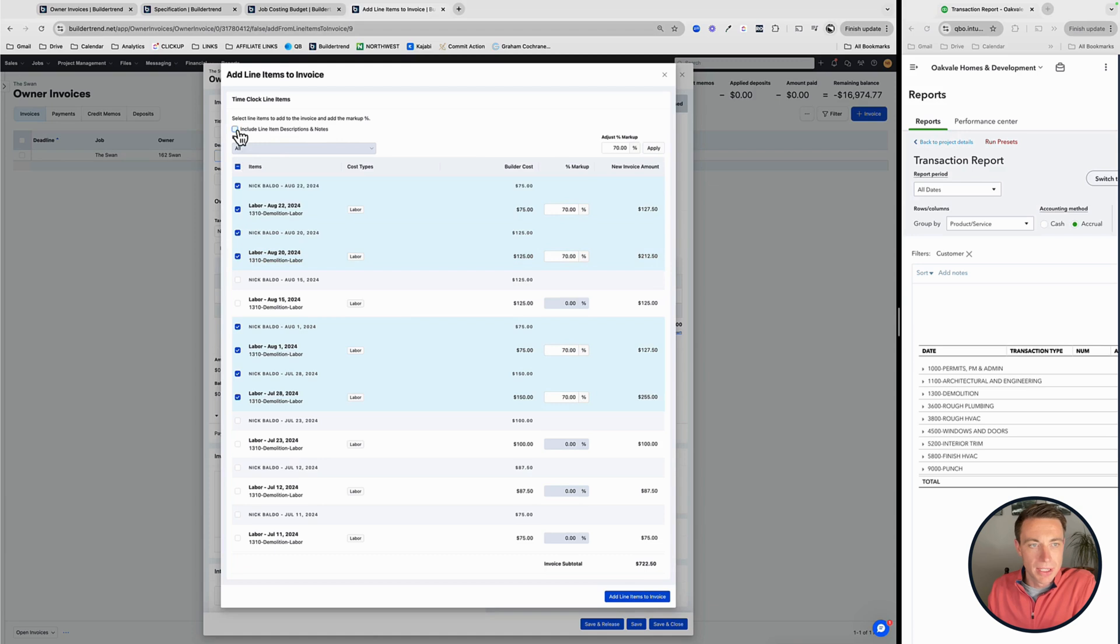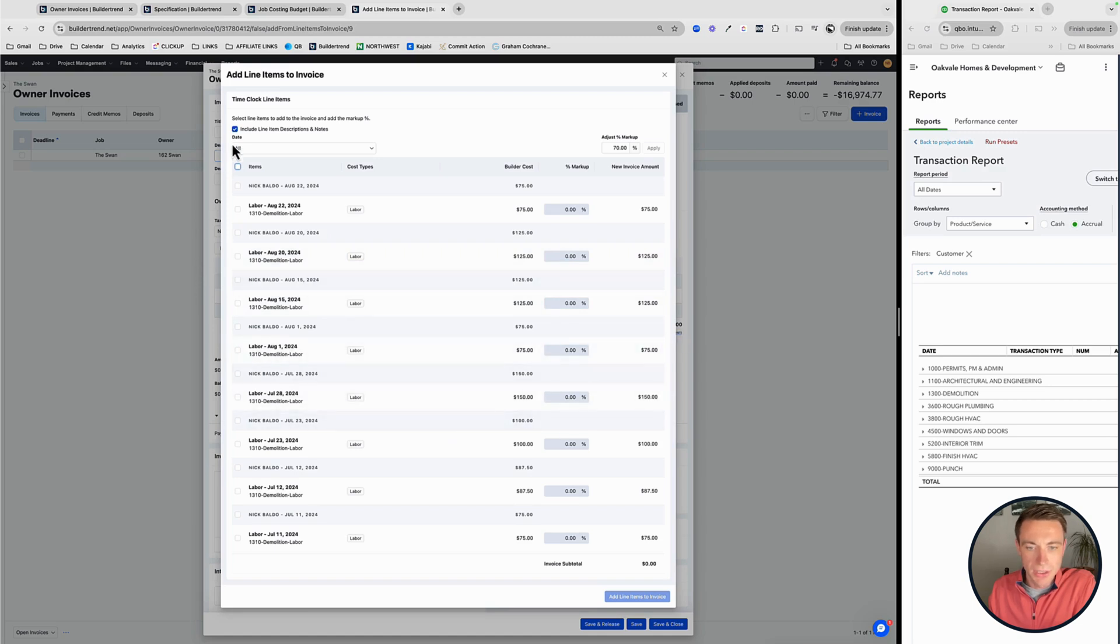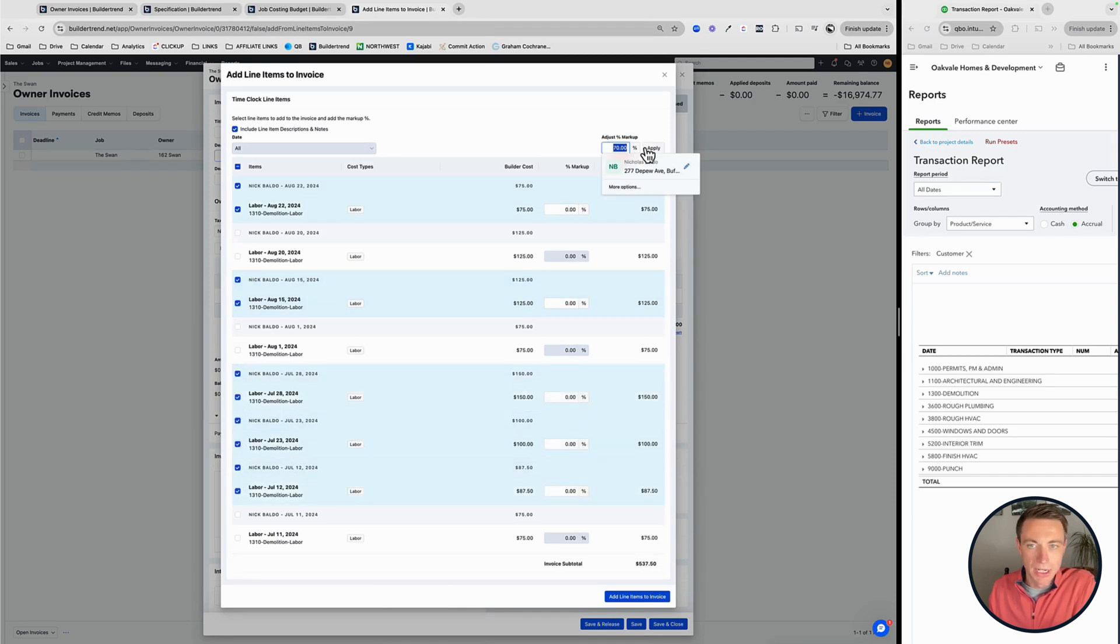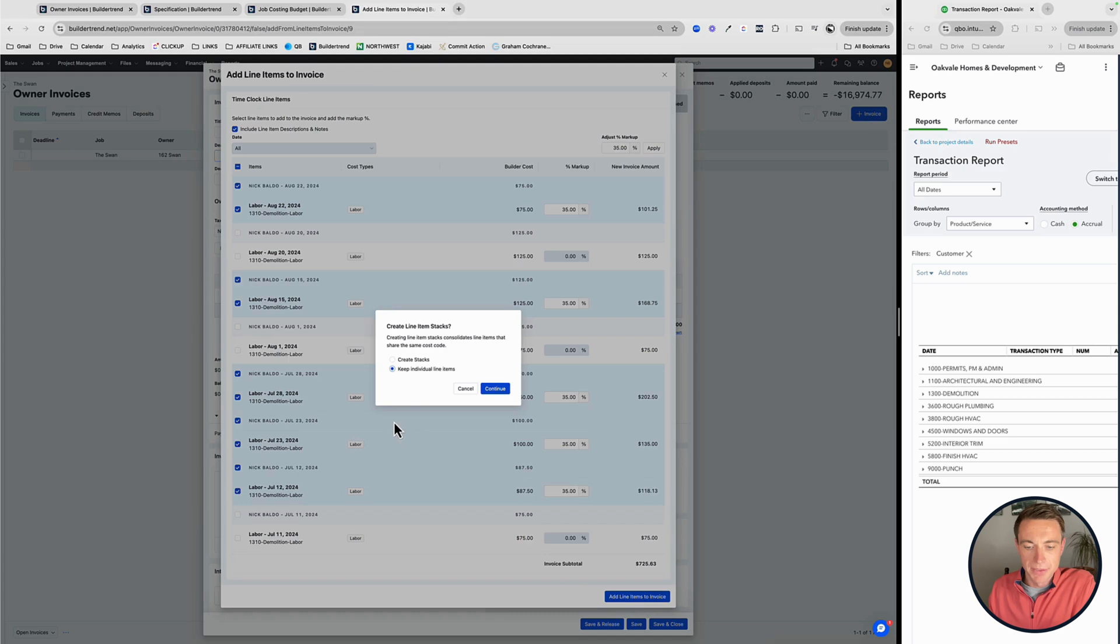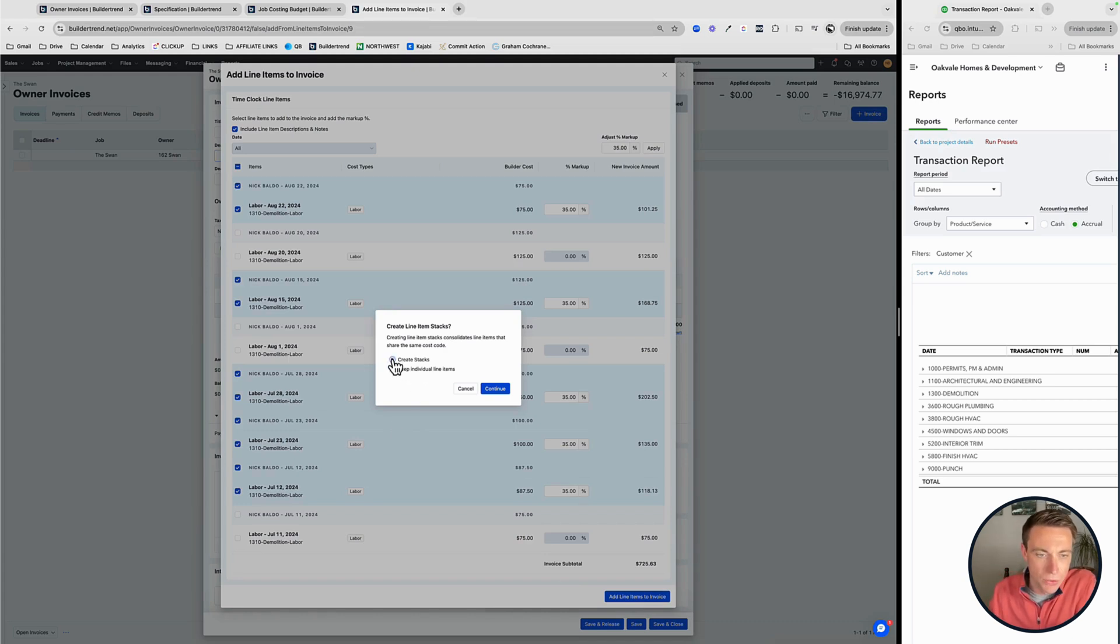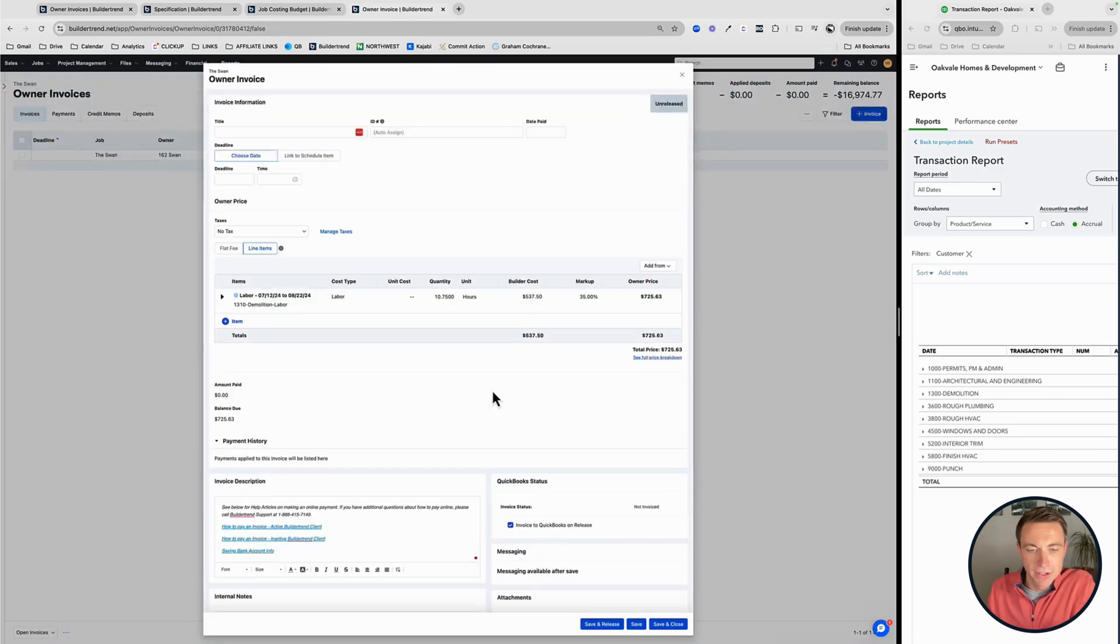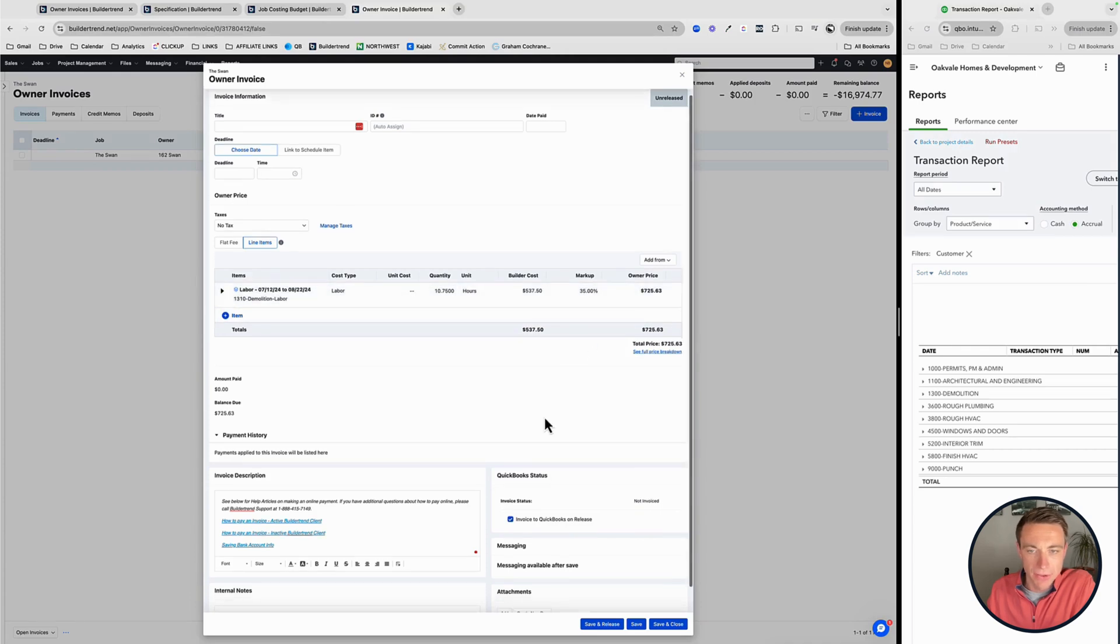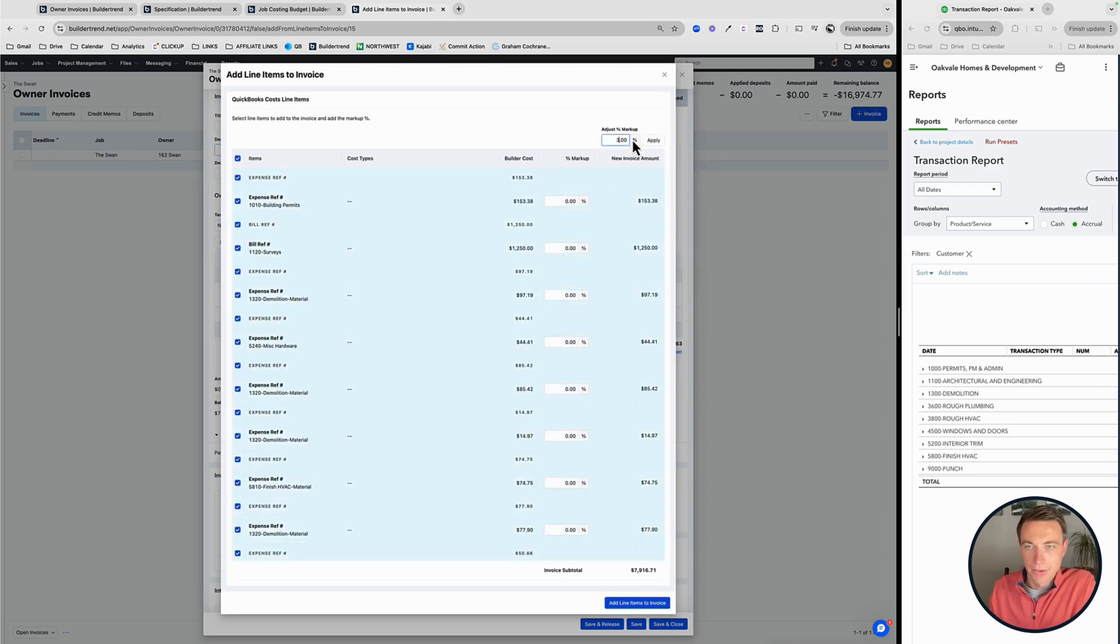And then the other ones that didn't get that percentage, we can do at a different rate. So if you have different resources at different markups, you can do different ones for them as well. Then you can add those line items to the invoice. And I like to do this, keep individual lineups or create stacks. This is a cool way for everything. I have a lot of demo labor in there. Instead of doing an individual line for each, it's going to use one line per cost code, which is really, really useful. And again, this one's got some QuickBooks costs. So I'll bring those in as well with a 35% markup.